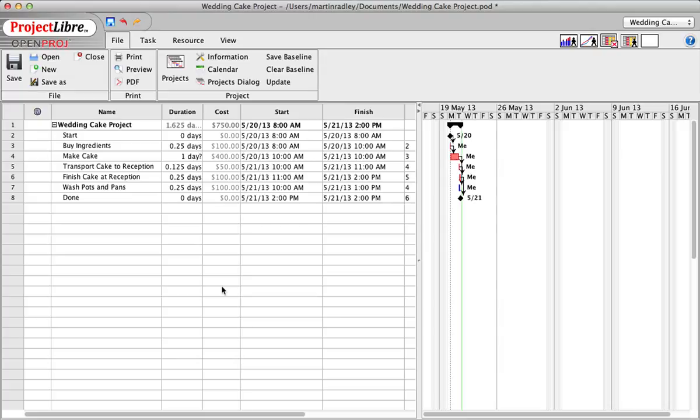The third one is make sure vacations are accounted for somewhere. What I do is create a schedule item called vacations, and I make it an item underneath the overall project.